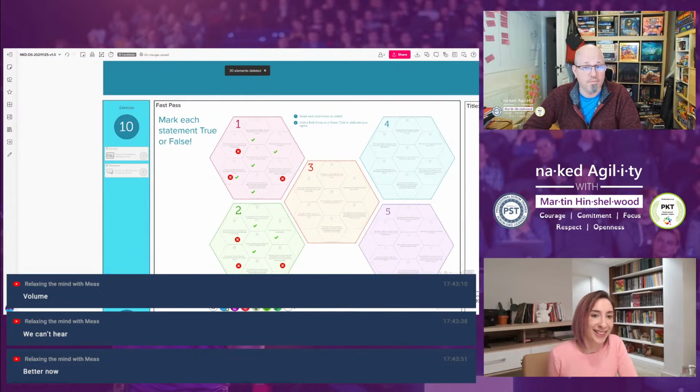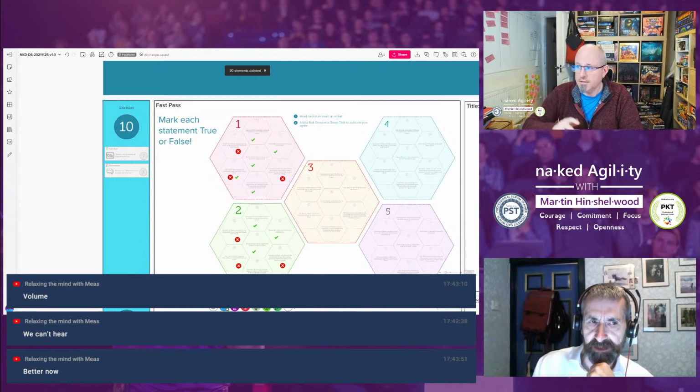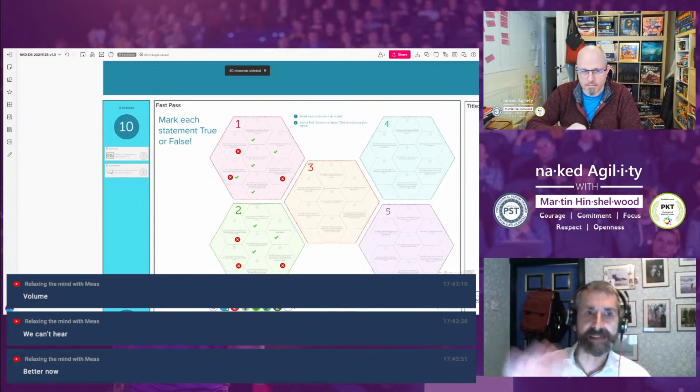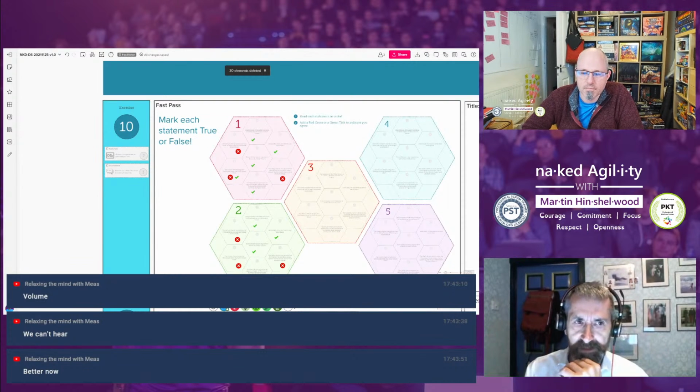So what I'm inclined to do is set up a 15-minute meeting, and then immediately afterwards set up another separate 15-minute meeting, with the expectation that the follow-up meeting is the breakout, because I got fed up with people in Scrum meetings saying, Martin, I must talk to you about X. Go, I've got a meeting. I've got a meeting after this. I'm too busy. And in the ideal world, you never use it. But then no one has got an excuse to say, I'm sorry, I've got a meeting after this.